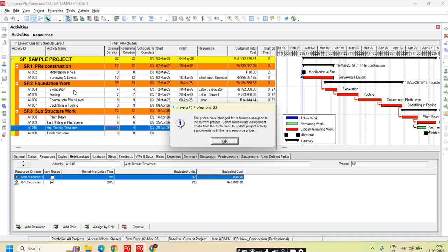In the site, when I want to excavate, we have to calculate the area first, as per the building measurement, to see what area is required to be excavated. According to that, we will give the quantity, that this much cubic meter of work will be done, or this much square meter or square feet of work. Basically, most of the work that you see will be in cubic meter only.